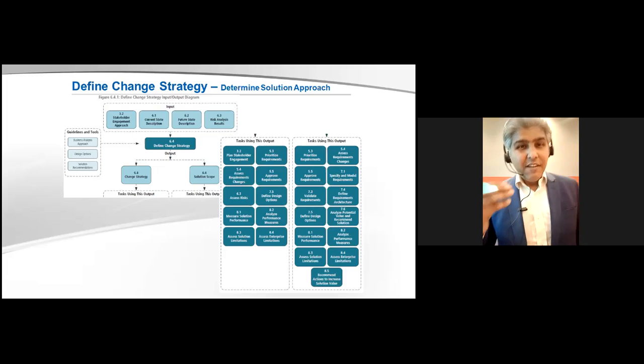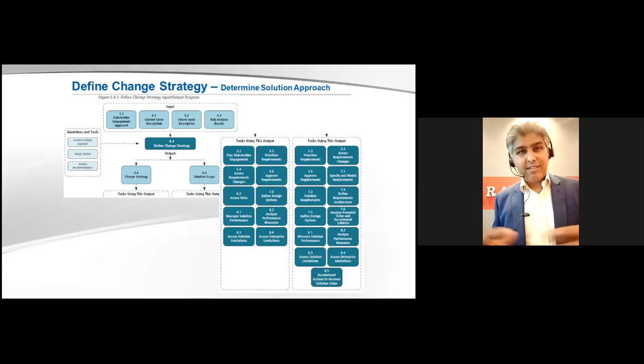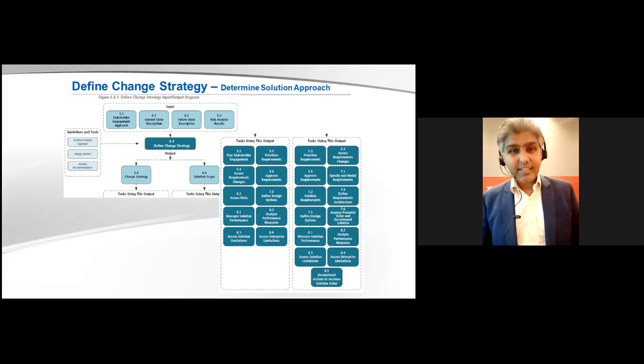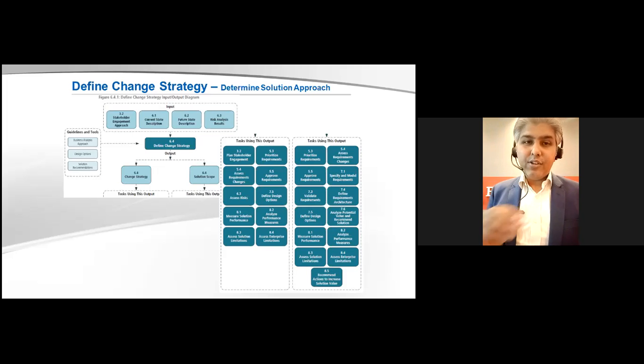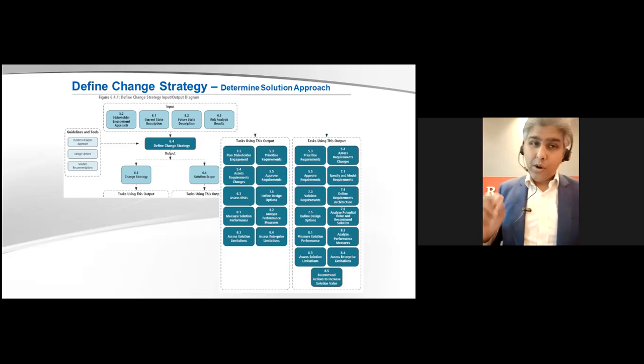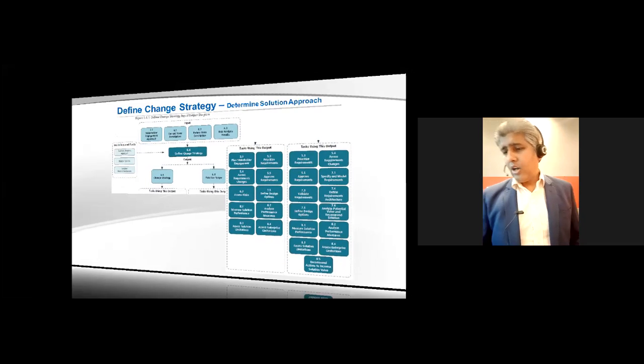So risks which do not have significant value, or that are not tangible, we put them in the risk list. We actually monitor that as well, but there is no significant strategy for that. We just put like 10-15% in the timeline, so that accounts for these kind of smaller impacts. But if the impact is high and you think that it has a high impact, high probability, then definitely you have to consider a proper mitigation strategy, not accepting the risk as part of the timeline. I hope I answered the question.